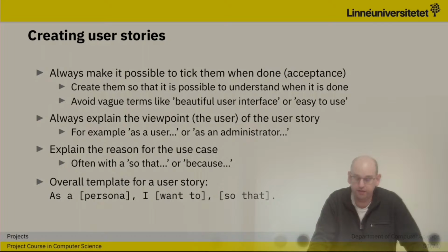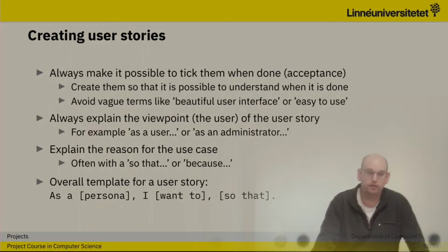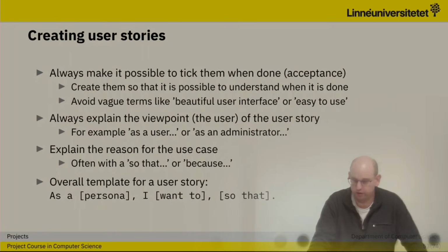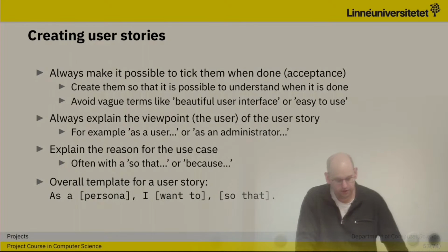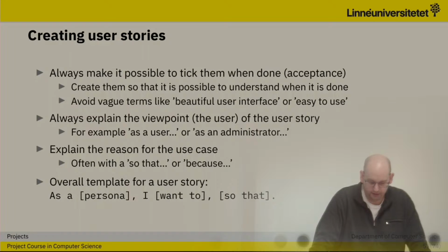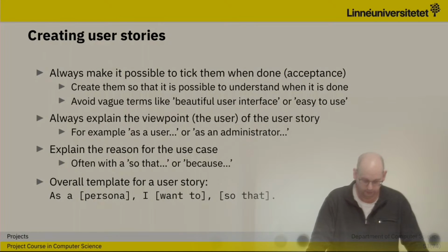Create them so it's possible to understand when they are done. It should be easy to know, well, now everything is in the database and it's done, or whatever it might be. Also avoid vague terms like beautiful user interface and easy to use and fast and responsive and so on, because that's something that's different for different people.